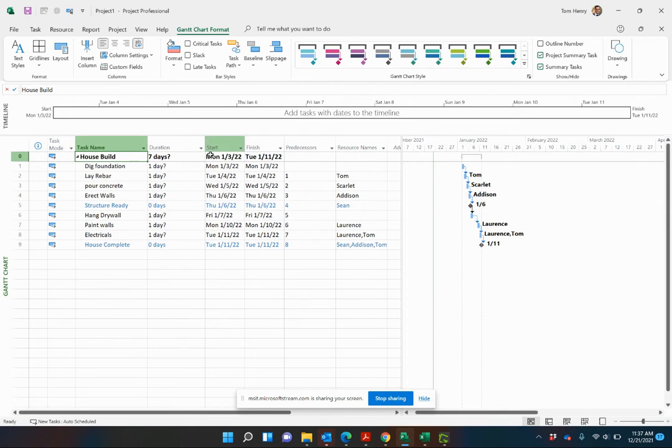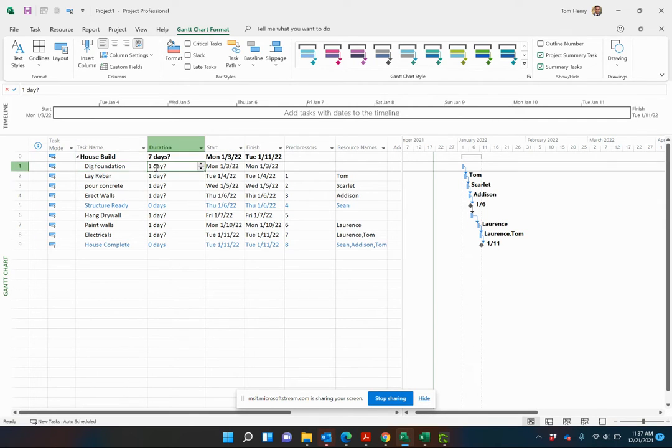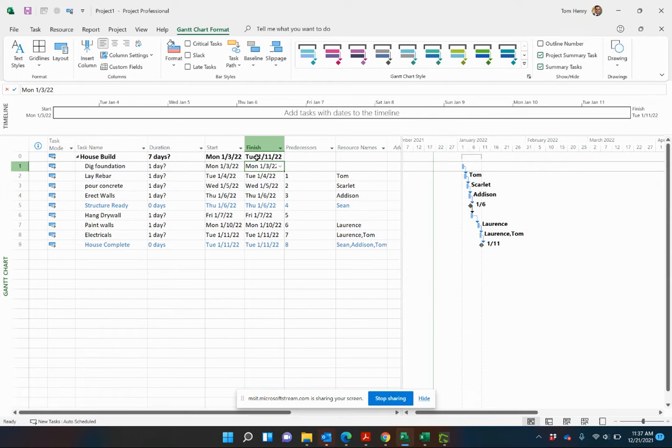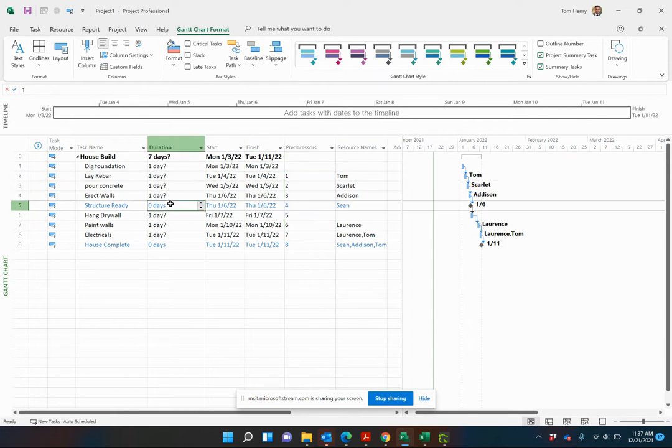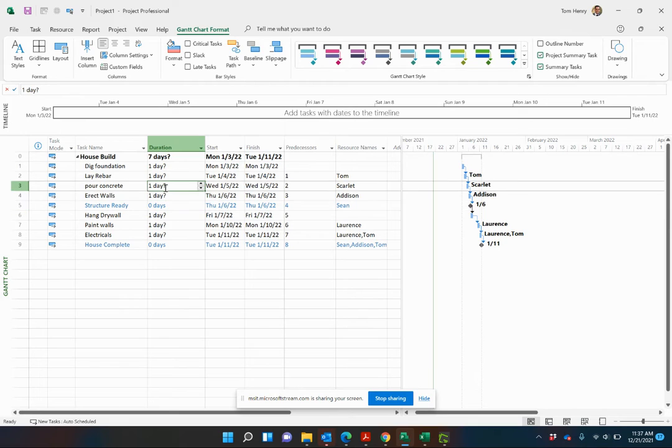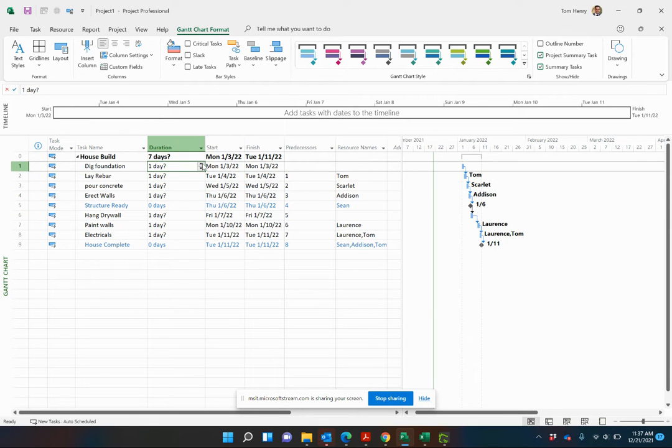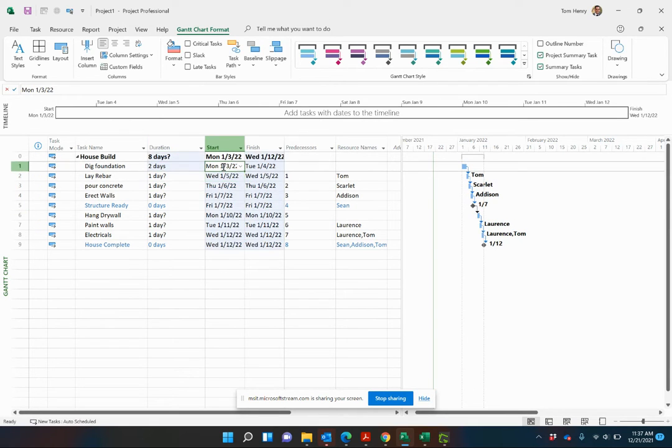Before we do that, I want to explain what I mean by that. The duration is simply the delta between the start and finish date of a given task. You see in this project schedule, I've actually gone in and done my predecessors. For example, if I make this two days, you can see that the delta between 1/3 and 1/4 is now two days.